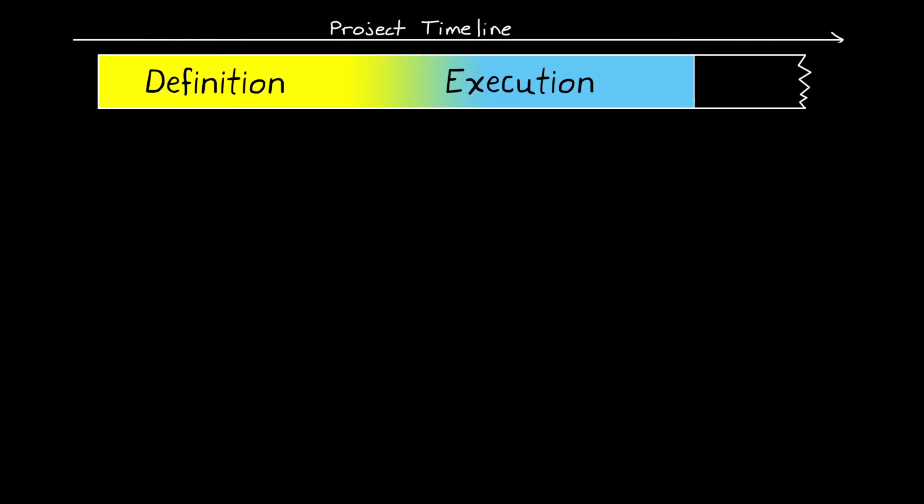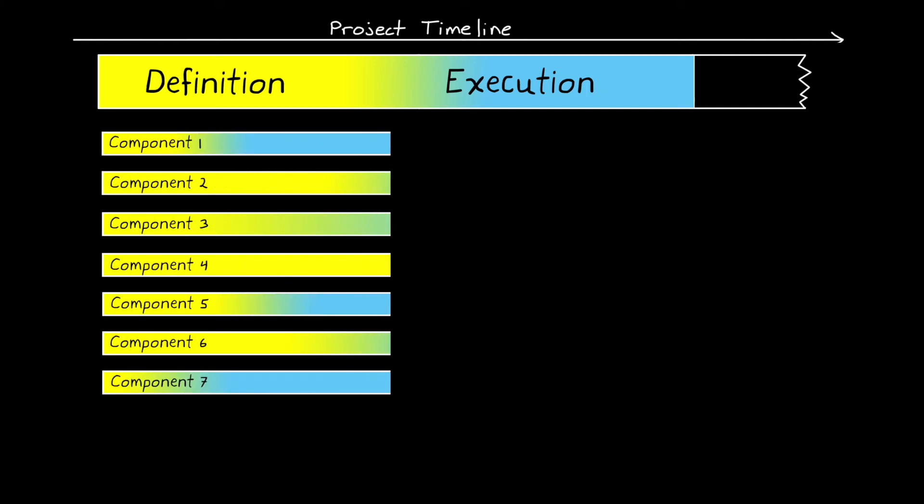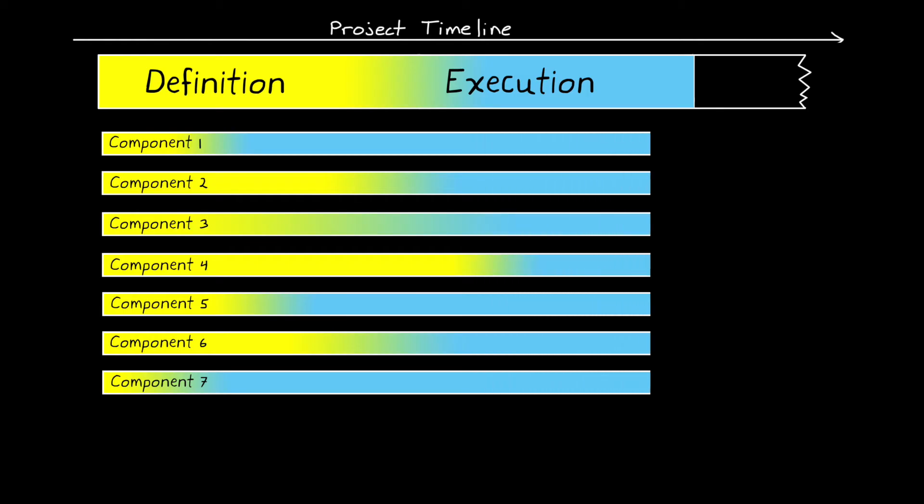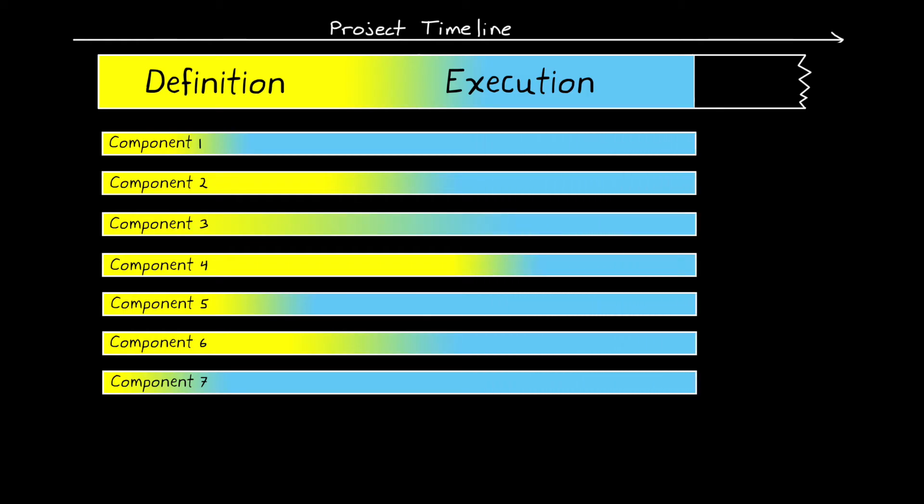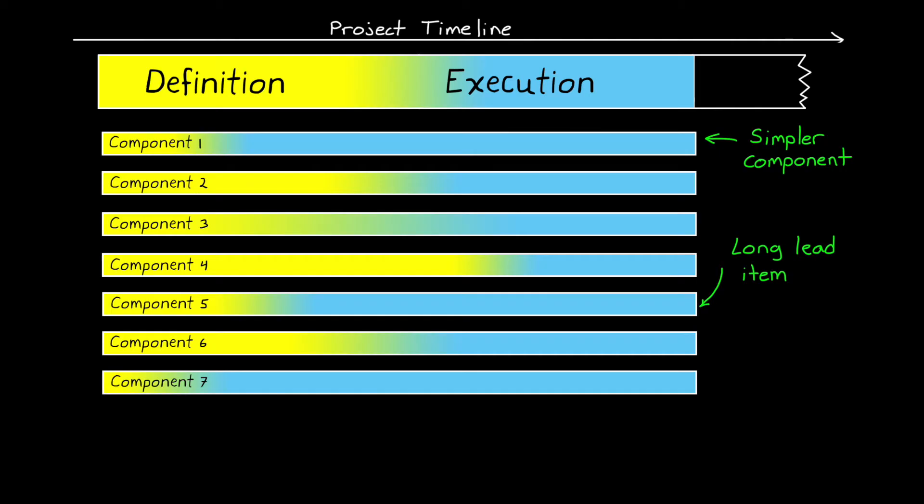Furthermore, this graphic is kind of giving the impression that the entire project is transitioning at the same time. But complex engineering is messy, and often certain components begin detailed design, while others haven't really been thought about very much. And this might be because some components are naturally simpler, and so you can commit to a design earlier.